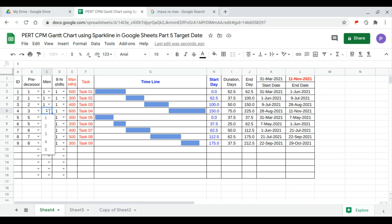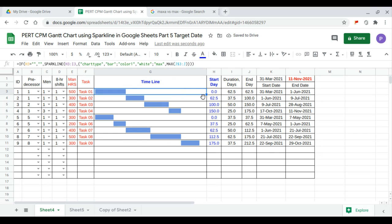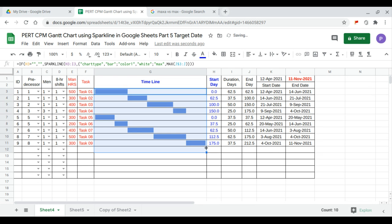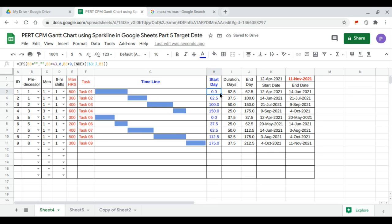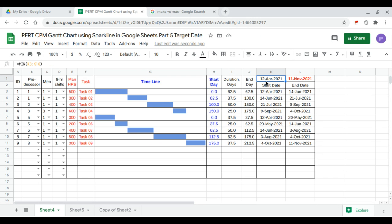I'd like to shorten this, so I'll assign maybe three men to that task. After updating, the starting date becomes April 12, 2021.